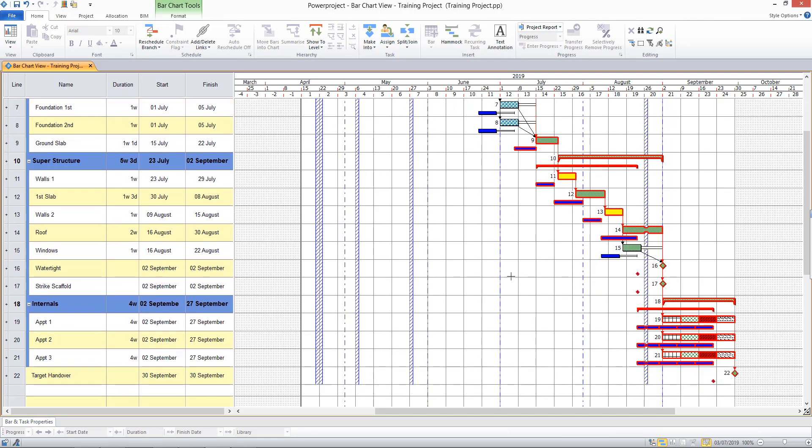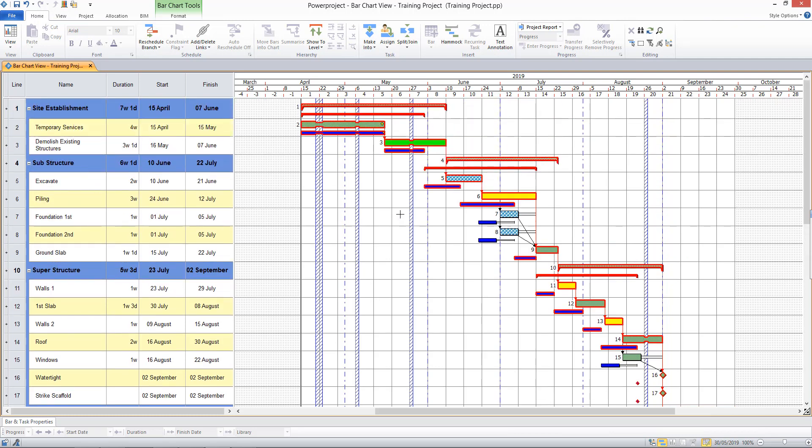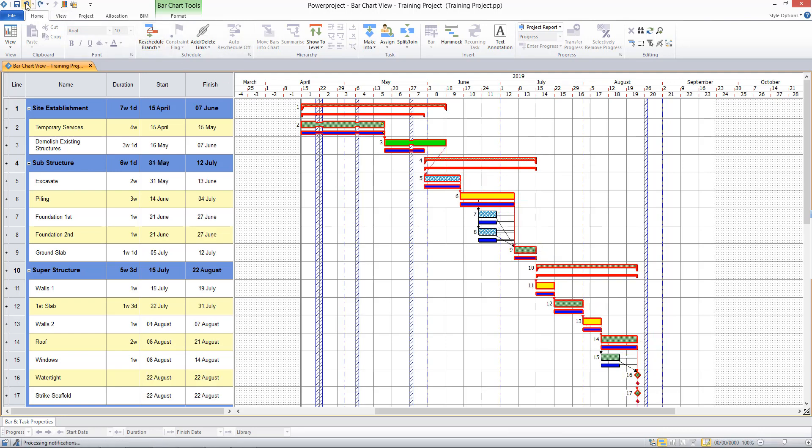Going right the way through to the bottom of the project, you can see the variance between the planned finish date and the current or projected finish date. Baselines make it much easier to work with what-if scenarios, and I can now undo and put everything back as it was in the baseline.